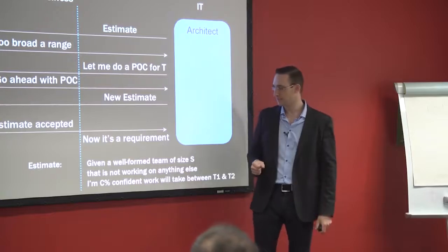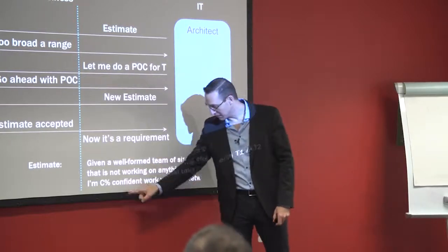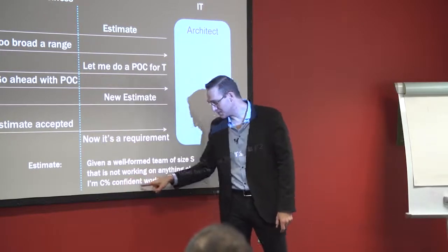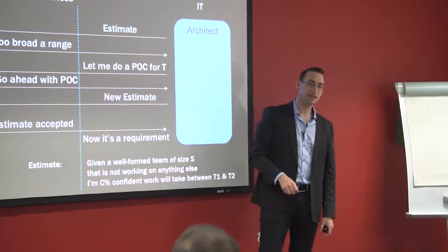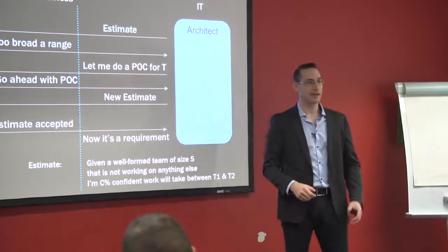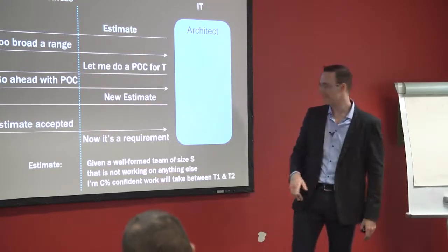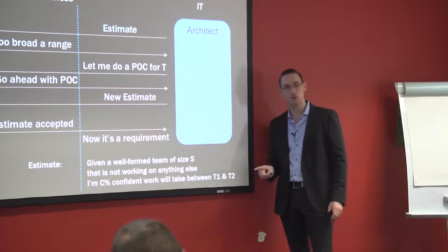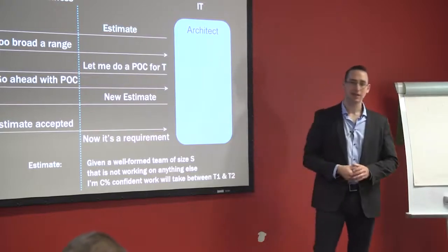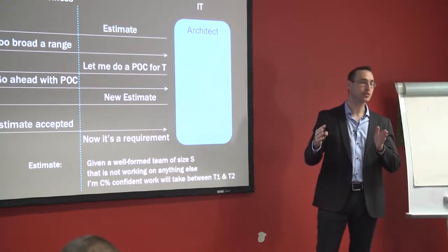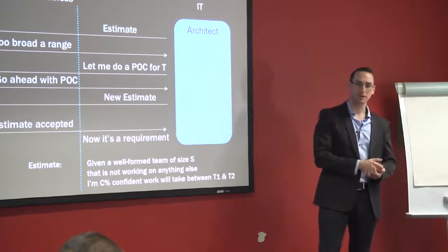All right? Here comes the next bit. I am C% confident, meaning this is not a promise. I'm providing you with a level of confidence that it will take between T1 and T2. An estimate has a range and a degree of confidence.